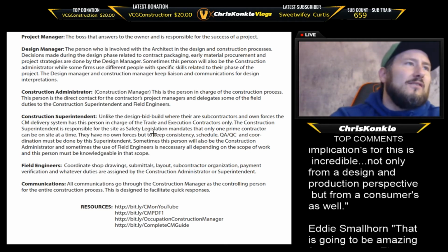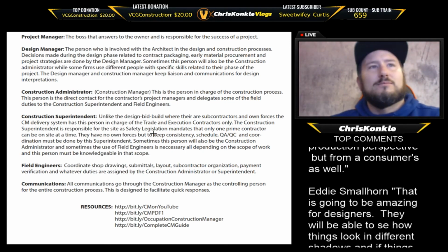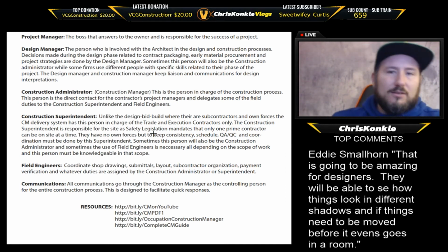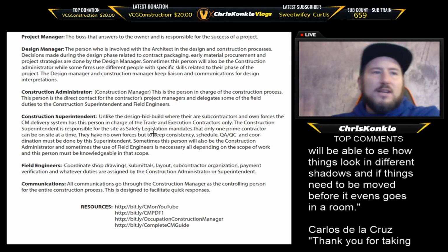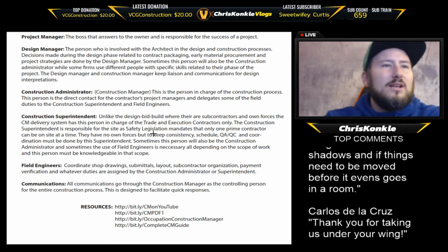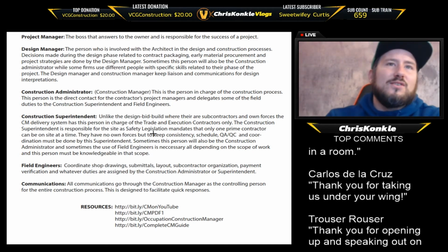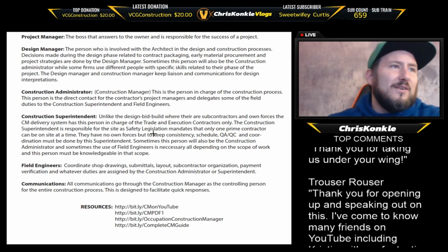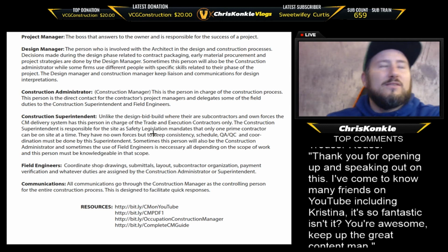So the field engineers will coordinate shop drawings and submittals. So submittals like different product submittals, MSDS sheet submittals. There's all kinds of different submittals. We'll go over that in another video. And then the field engineers are just there to help out, right? So payment verification and layout, things like that, is what the field engineers will do.